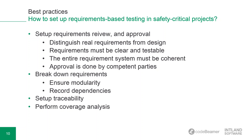The next consideration is test-based design and traceability identification: test cases need to be traced and mapped back to the appropriate requirements, providing traceability from product requirements to test cases. Then there is test execution and defect management — it is the job of the test organization to record and manage any defects that occur during test execution and in all phases of testing. Last but not least, coverage analysis: a periodic progress report should be delivered to the project team, based on coverage analysis of requirements against test cases and outstanding defects.